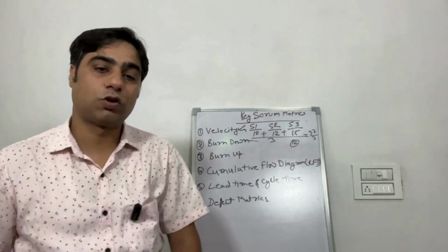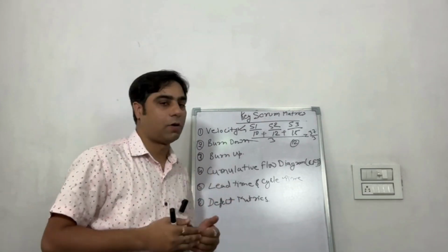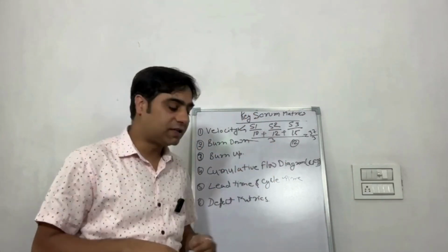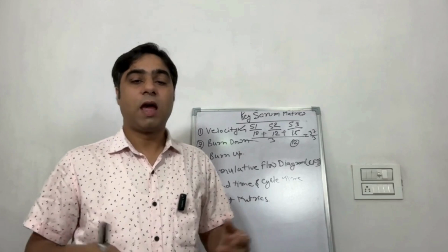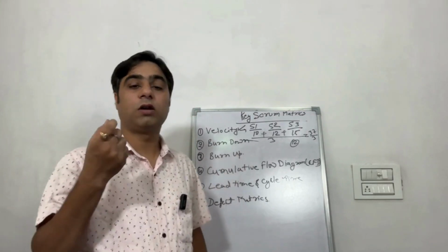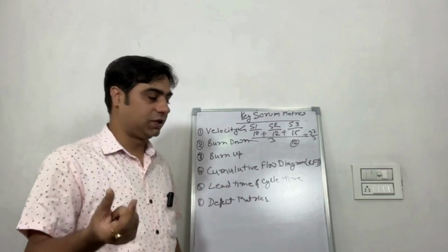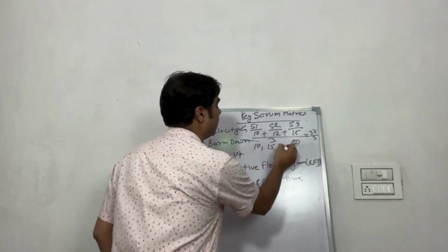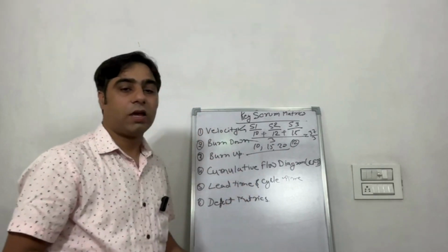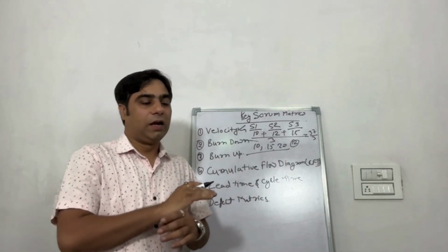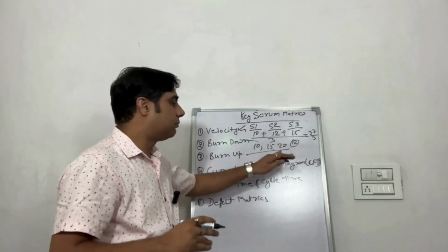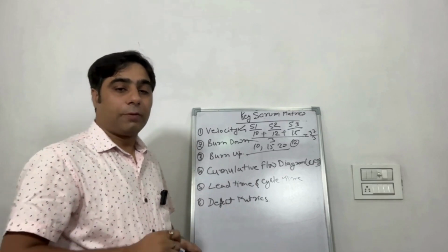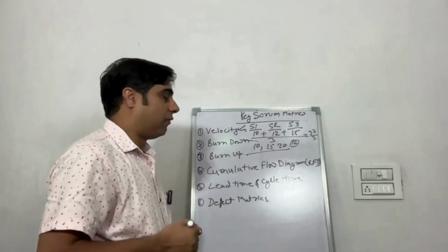The important note is that velocity is unique for each team. Let's suppose you are managing 3 teams, and the 3 teams have their own velocity. One team may have 10, one team may have 15, one team may have 12 or 20. It is not interrelated to any other team, but is absolutely separate for each team.